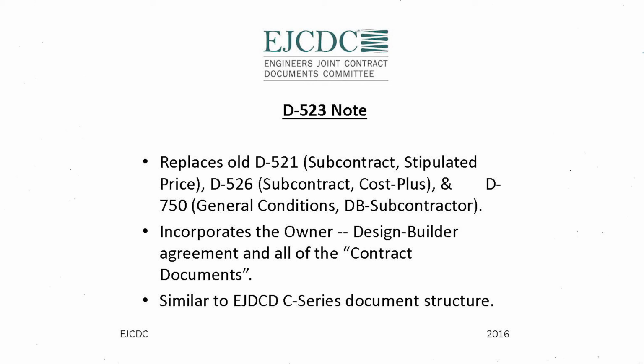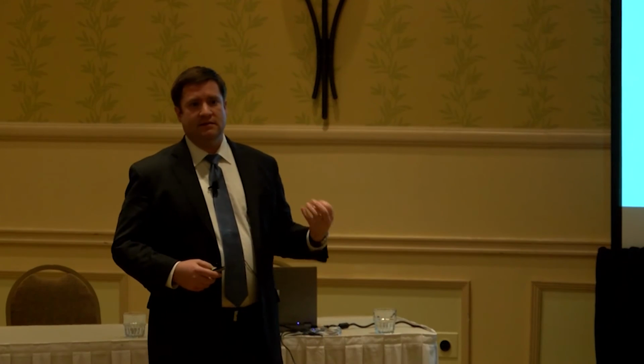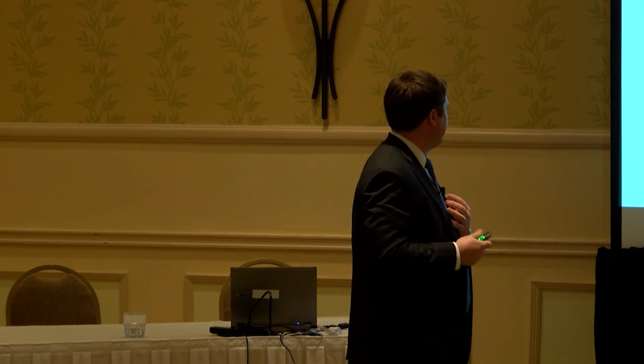Another important part of this document is that it incorporates the owner's design builder contract on what you might sometimes hear as a flow down basis. It'll say that all the terms and conditions of the document with the owner and design builder will apply to the subcontractor as applicable to their services. This is the type of provision you see a lot in design build projects, P3 type projects, where a lot of times the owners even require that your subcontractors and contractors are obligated to you to the same extent that you're obligated to me, being the design builder.